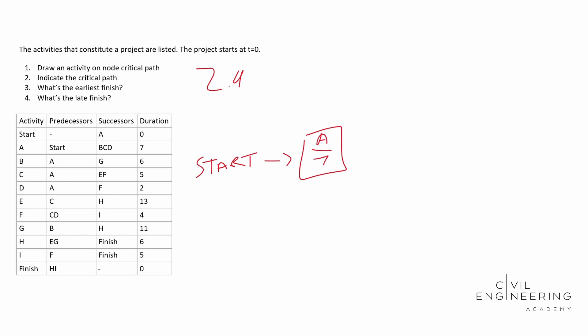So now we have to do something called early start, early finish, late start, late finish. Early start for A is going to be on day zero, right? That's the earliest that it can start. The earliest it can finish is on day seven. And this will make sense here in a minute, because it's seven days long. That's how long it's going to take activity A to complete. We're not even going to worry about late yet. That's for our backwards pass.